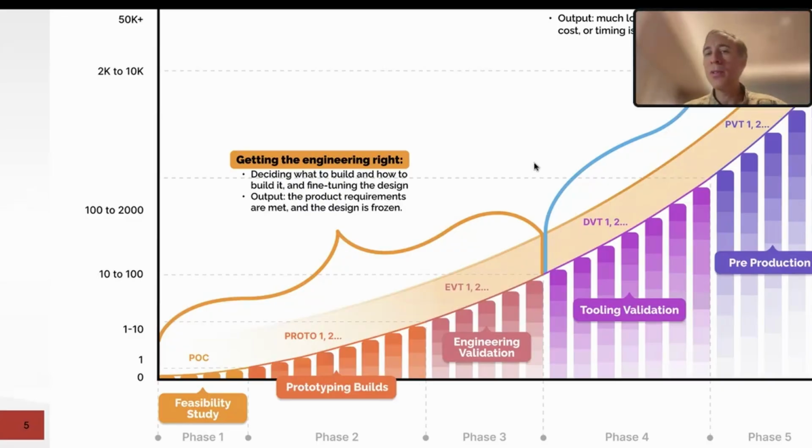And finally, remember, this is really where the engineering team passes the baby over. In many companies, anyway, that's the way it works. They're still involved and they follow up in the back, of course, but they pass it to more of an operations team, right? So things like the test plan and the checklist used on the prototypes need to be fine-tuned a little bit, to make sure that the team, maybe the quality team, that starts to own that really understands it. Similarly, when the engineers put together the last prototype, maybe they should make a video. This is a very good practice to really show that's the way we put it together, and you can see exactly how we do it and so on.